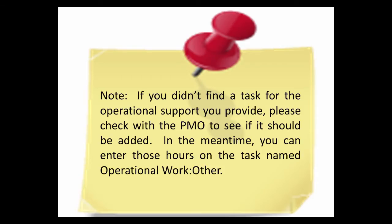If you didn't find a task for the operational support you provide, please check with the PMO to see if it should be added. In the meantime, you can enter those hours on the task named Operational Work Other.